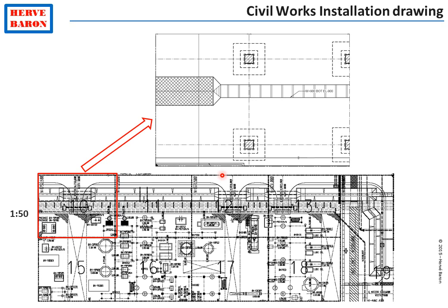The plant territory is divided into areas as shown on the key plan. For each area, an area drawing is issued, which will eventually show all the underground constructions and networks in this particular area. Nevertheless, these constructions and networks are progressively designed. Therefore, these area drawings will be subject to numerous revisions. They will be issued in the same sequence as the works at site.